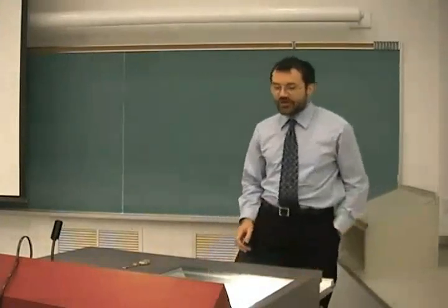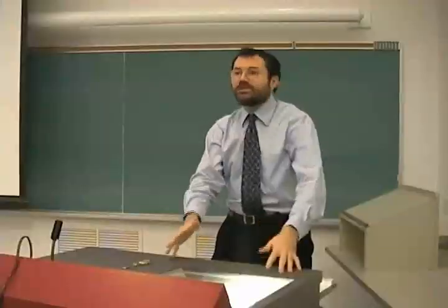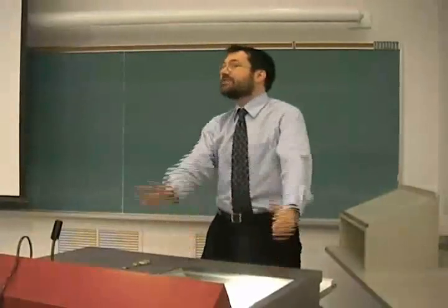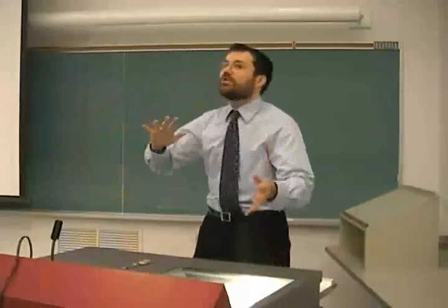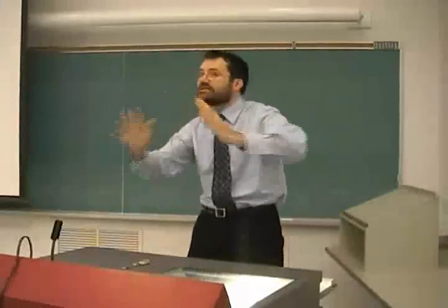So principle 4 for estimation is to realize that there are many differences from project to project. Just because you can estimate one project right doesn't mean you can estimate another project right. Different people will perform differently. For example, it's well known that there's a huge range, a huge scale of abilities among different software developers. One person might be able to program to a good level of quality in, say, 5 days. It might take 50 days for another person. There's known to be a 1 to 10 level of difference in abilities of people, in range of abilities of